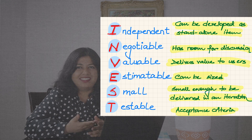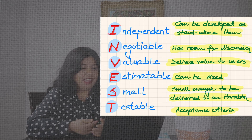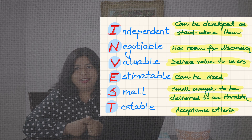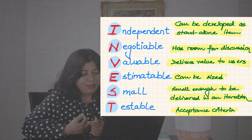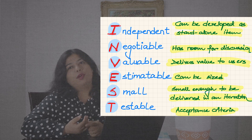INVEST stands for: Independent, Negotiable, Valuable, Estimatable, Small, and Testable. Even though Testable comes last, it is one of the key things that determines whether a user story is ready or not.